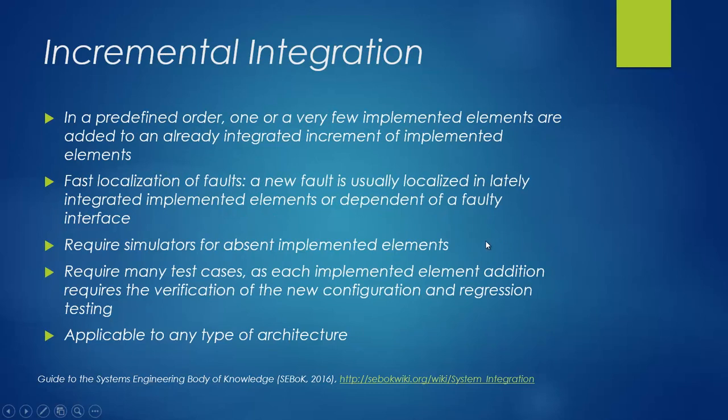A third technique is the incremental integration. In this technique, one or few elements are added to an already integrated increment of elements. Since the integration will be added incrementally, a new fault is usually localized in the lately integrated elements or dependent on a faulty interface.